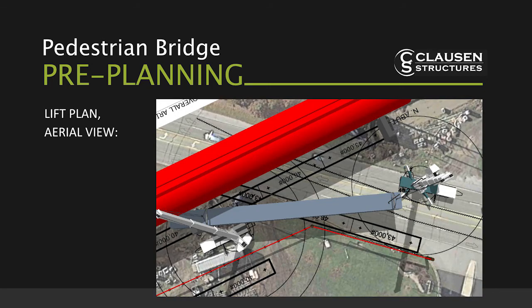Here we'll depict exactly what you were talking about. On the left portion of the screen, you had to bring in your rigging quite a bit, again, to accommodate for those high voltage wires. So that's a nice diagram showing where the actual bridge spans were connected and initially staged to the point where you had your first pick, which would meet up with a common abutment. So both span 1 and span 2 will join up with this middle pier, correct? Yeah, the pier on the other side, and you can see why the rigging was so critical, that it was shortened up just because it was such a tight working space with that bridge.